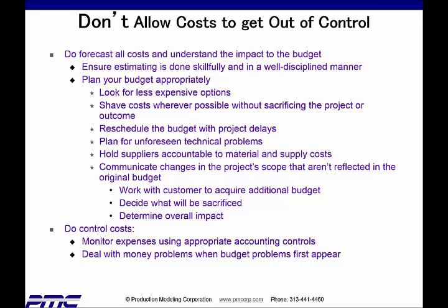Reschedule the budget with project delays. Plan for unforeseen technical problems. Hold your suppliers accountable to material and supply costs. Oftentimes the supplier would like to raise the cost after the order has been placed. You need to hold them accountable to the original prices.